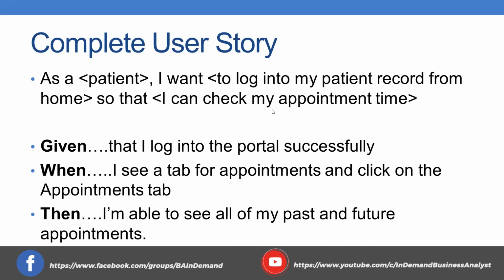So he got the, they call it, the epic. Yeah, that's the word I'm looking for. So once he got all those things from the product owner, that's the epic. And for the Scrum Master to give this to the developer, he has to break it into stories and then into tasks. So that's the same thing that's happening here.